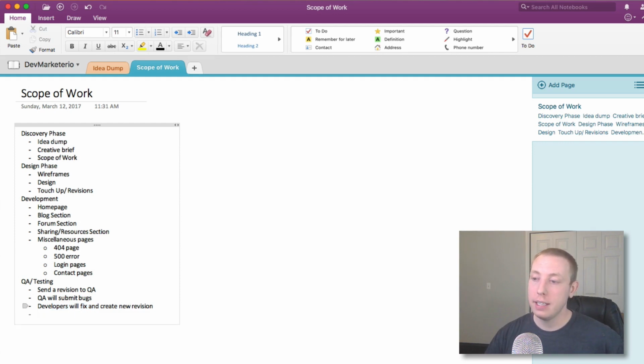After you get through QA and testing, you're into the final stage, which is deployment. Generally, when I was working, we always allotted time, depending on the size of the project. If it's just a small website, you might only allot 1 day. But for a large project like this, we generally did like a week or 3 to 4 days. This is not only to deploy the website, but because there's always going to be some little problem that happens. Some SSL certificate doesn't authenticate, or the database is taking longer than normal, or whatever. There's always something that happens. And so that's why it's good to allot some time where you schedule nothing else to be done except deployment.